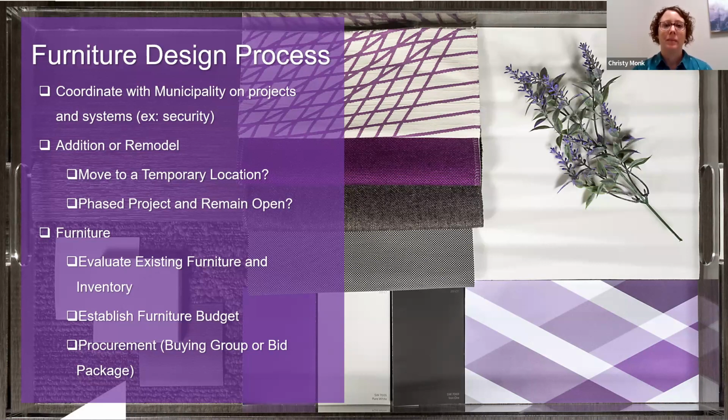So timing wise, it's a little bit delayed from the actual building construction, but it's really done that way by design so that you can change the actual package as you need to, and coordinate those items with the building itself to make sure that you have power where you need power, you have technology where you need technology. All of those things are part and parcel to one another, but they don't happen at the same exact time.